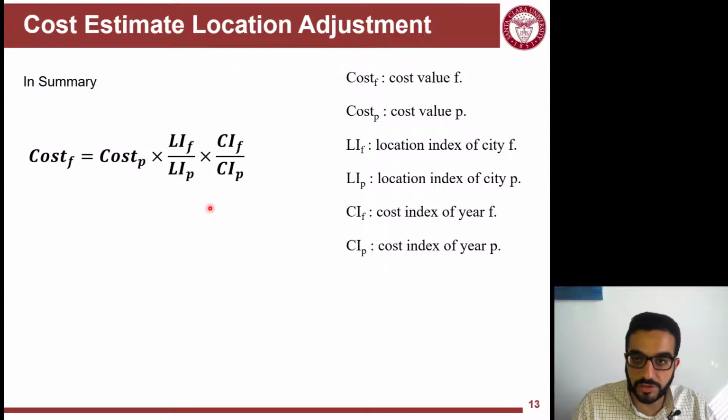But time is really critical, because over time you build experience, and the data you have in the system or in this book represents the experience of doing this work. To reuse that experience in future projects, you have to adjust for the difference in time and inflation.